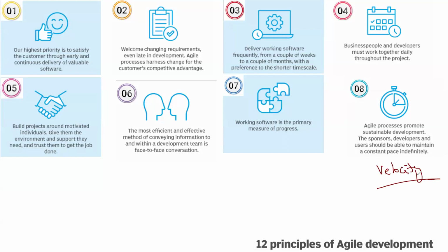In week 1, assume it's too much of requirement, so we'll ask the team to do the work overtime and they finish 20 features in week 1. Week 2, they are not that busy, so they finish only 10. Not acceptable. There should be a sustainable way of maintaining a constant pace.